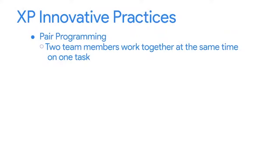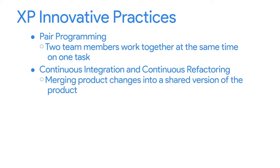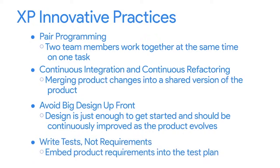XP features some other innovative practices used across many Agile teams. First, there's pair programming, when two team members work together at the same time on one task — usually in the same physical location, but can happen remotely too. Another practice is continuous integration and continuous refactoring — merging product changes into a shared version several times a day to get quick feedback on the quality of the code or product. Then there's avoid big design up front, meaning the design should be just enough to get started and should be continuously improved as the product evolves. And finally, there's write tests, not requirements — instead of writing a product requirements document and then later writing a test plan, your test plan serves two purposes: telling the team what to build and comparing what they built to what was supposed to be built.